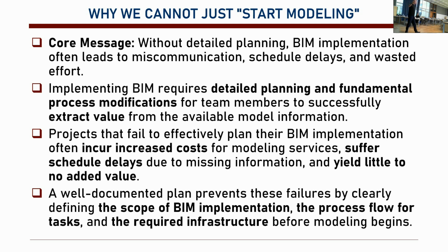This means that the whole building design process, I'm not going to say architectural design process because we have many different layers, is all organized and planned at the beginning. So we will tell the architect, for instance, you will come up with this level of information at this stage. Don't go further, okay? You will prepare that. Basically, if we don't do that, we will be wasting money.